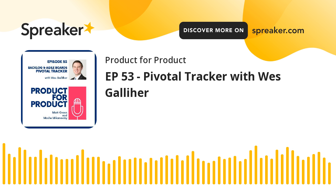But how do you set up those high level priorities? How does that work? Yeah, and this is where I believe that some teams try to utilize other tools for backlog management and release management and product backlog management. And so I think it's very strongly opinionated that your priorities should be set in your product management tool, which we use ProdPad for. And only when it's ready for the next couple of sprints or iterations do you want to put that into your backlog management tool for that upcoming release or two.